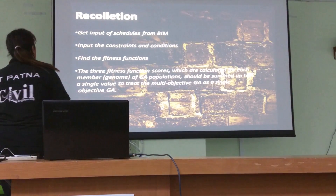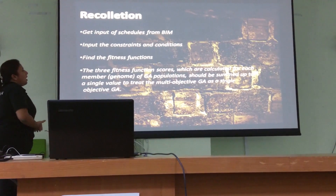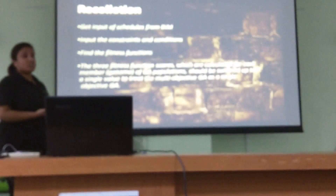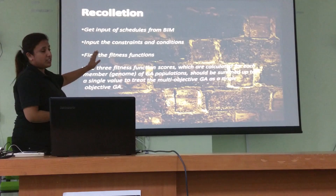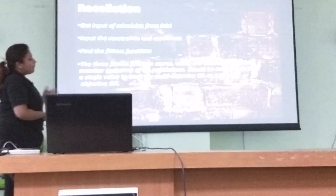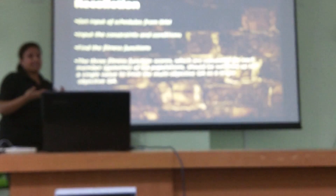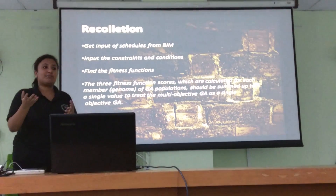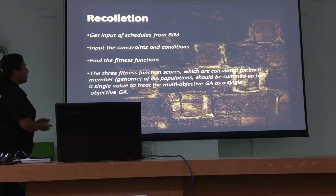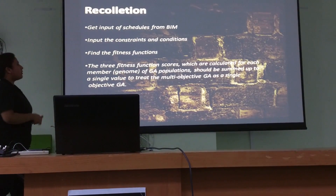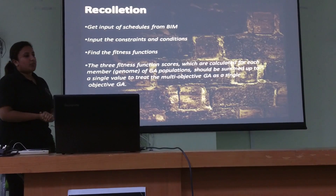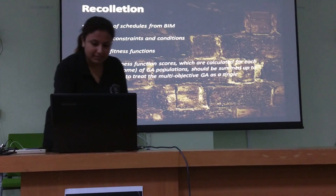So what is the recap we can draw from the project? We will get our schedule inputs from the BIM. We will put the input constraints and conditions using the MOCCs — the constraints being construction dependencies, and the conditions being labour cost, material cost, and supply chain. Then we will find the fitness function: what is supposed to be the best. A column with zero cost is optimized but is not the fittest option. Because we have three objective functions — three fitness functions — we will use these three fitness function scores, calibrated for each variable, then summed to a single value to treat the multi-objective GA as a single-objective GA. That's all. Thank you.